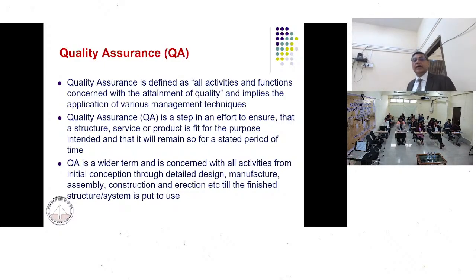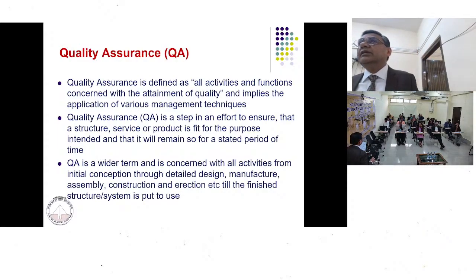Quality assurance is defined as all activities and functions concerned with the attainment of quality and implies the applications of various management techniques. Management techniques means how many quality control people are there? Are there overlaps in their time frame or not? Are they really qualified to look in the quality control?